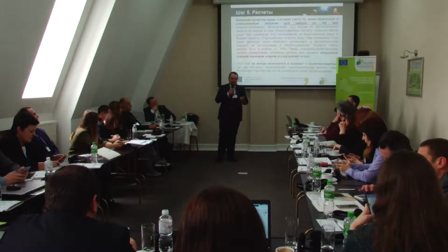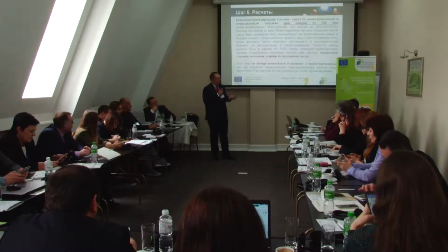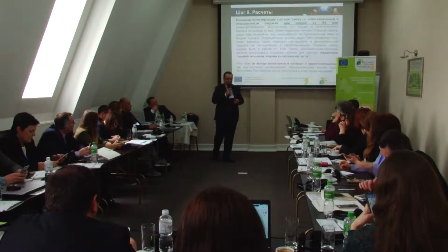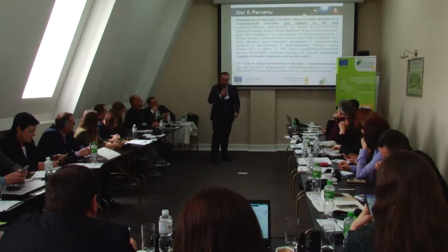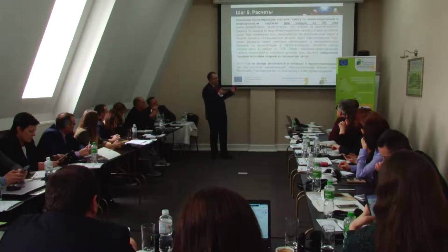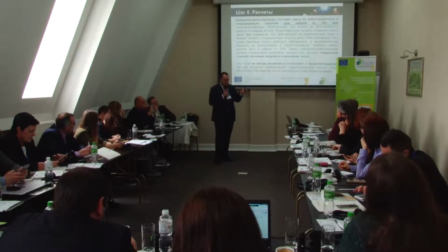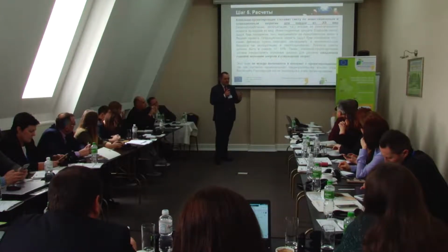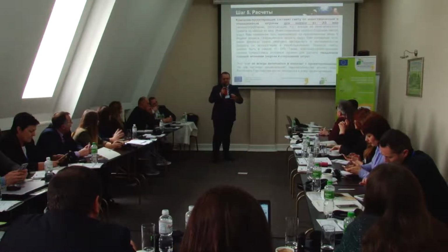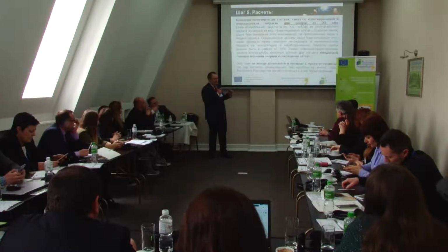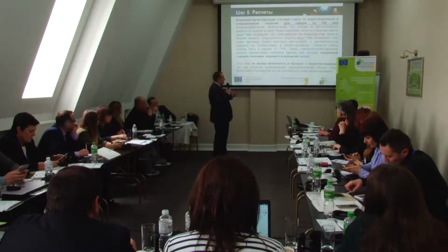Let it be a replacement of street lighting, let us say of lamps, ordinary lamps with LED lamps, with the installation of the management system, of control system. And he has said that the cost is 1 million euros. We do remember these plus minus 25%, which means that there may be error at that level. The designer already deals with more accurate figures, so it's probably not 25% already, but 10%.